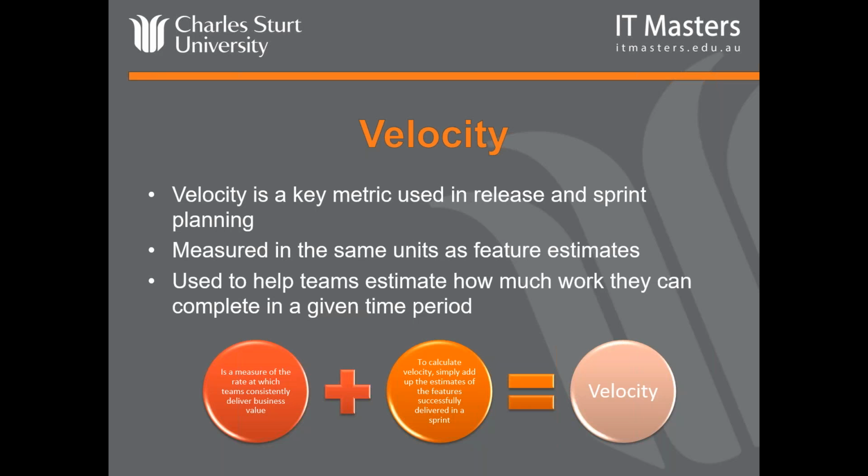The team then writes down the calculated velocity in a chart or on a graph. In the first week or the first sprint, it probably has a little bit of value, but it's essential because it's about providing a basis for comparison moving forward. Each week, each sprint after that, the velocity tracking will provide better information as the team provides better estimates and become more used to the methodology.